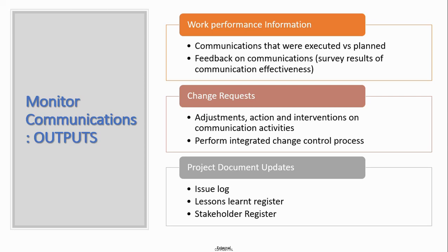And depending on that, you can take certain corrective actions and make adjustments to your communication plan. So sometimes it can raise a change request, because sometimes they might require some communication changes that involve certain cost. So then again it might require a change request to your project manager.